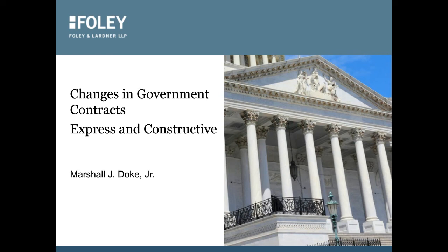Now I'm going to mention something that may be worth your whole day here, and that's claims. There's a request for an equitable adjustment that you can make, or you can submit a claim under the Contract Disputes Act. When you submit a claim, it can be on estimates. You don't have to have already incurred the cost. If you get a change order and you estimate it'd be $200,000 to complete it, you can submit a claim immediately based on that estimate.